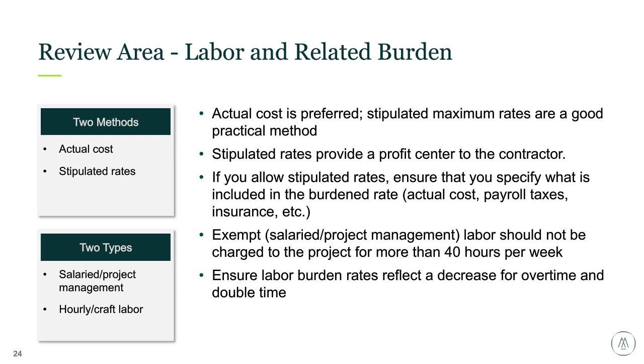Labor burden rate should decrease for overtime and double time, such as FICA, FUTA, SUTA, because the caps have already been reached. And again, on-site, off-site definitions can prevent excessive labor charges to you. You want to make sure that you're not paying for people off-site at the corporate offices or while they're driving to the job.